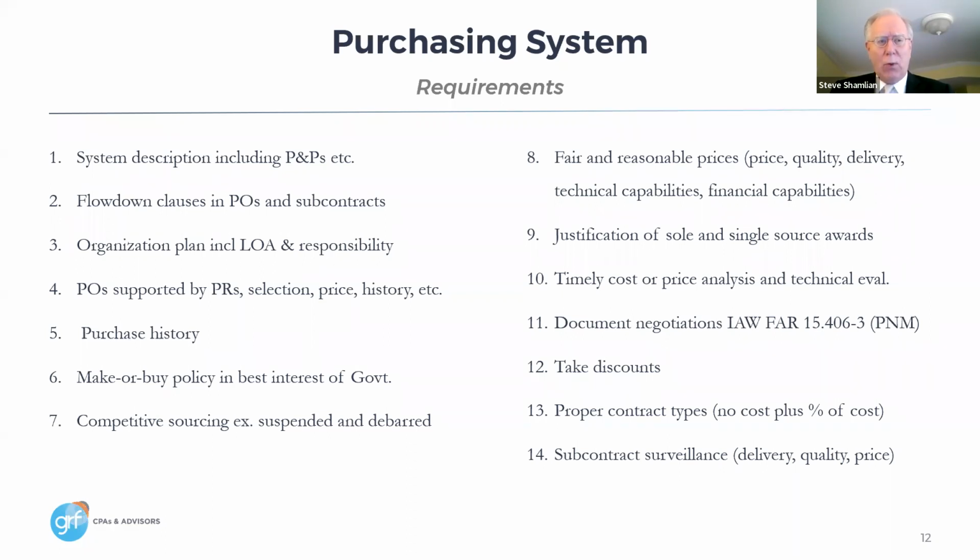It's a basis for doing some price analysis. This is what we paid for it in the past. This is what they want us to pay for it now. Is it reasonable? It also gives a history of your negotiations of the price. So past history shows that we negotiated a 10% discount over the original price.